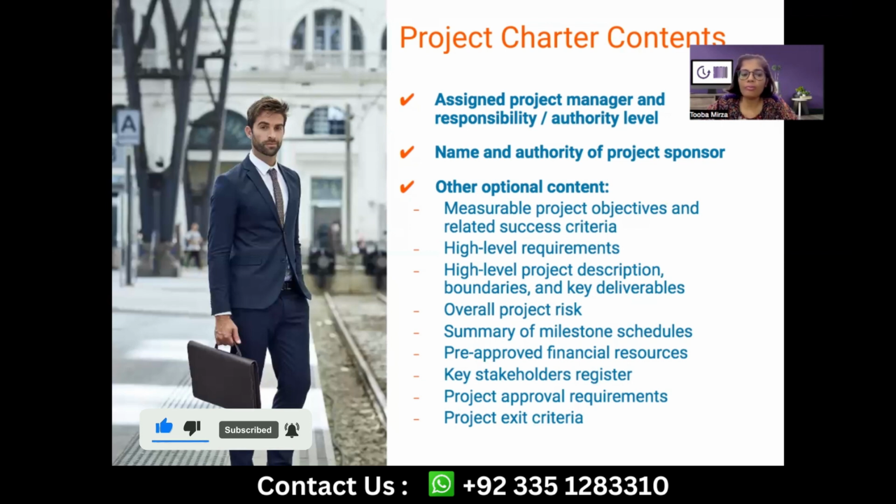And on top of it, the agreement is not accessible to everyone. A charter is ideally available to everyone. It should be available to everyone in the team and at a stakeholder level, because an agreement may have some very specific information about terms and conditions, confidentiality, budgetary information. So maybe you can't share that with everyone. An agreement is a very sensitive document. Yep. So practically,